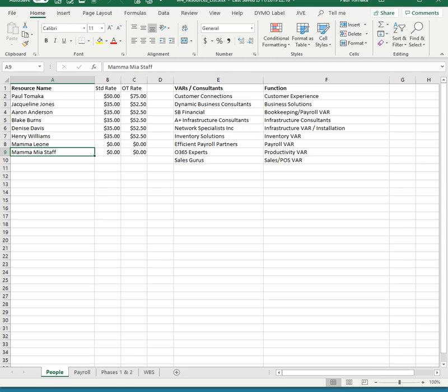Okay? It becomes much easier, so that when you say order equipment, you put the vendor's name next to it, and then you can enter the amount of the equipment that you ordered, you know, $5,000. You don't need to break it down into each individual item, because that's very, very labor intensive. And in reality, in almost every business, you're going to go through a vendor. You're not going to order it all yourself and list each individual item and then total it all up. It's a whole lot of extra work.